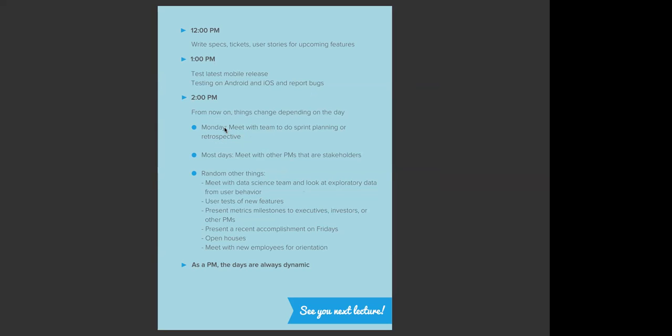Some companies do every 2 weeks, some every 3 weeks. 4 weeks is a little too much, because then your team is building too much without enough signals for you to catch any errors. So 2 to 3 weeks is usually the right cadence.